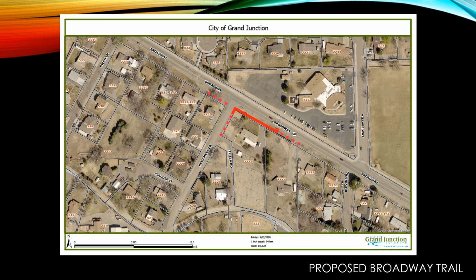Tangential to the above is the timing of improvements. We do not see a building permit being pulled for many months. Adding to that the time it takes to construct a home, it will be between a year and a half before the obligation for a turn lane, relocated pedestrian crossing on Broadway, and some length of additional Broadway trail will be started.